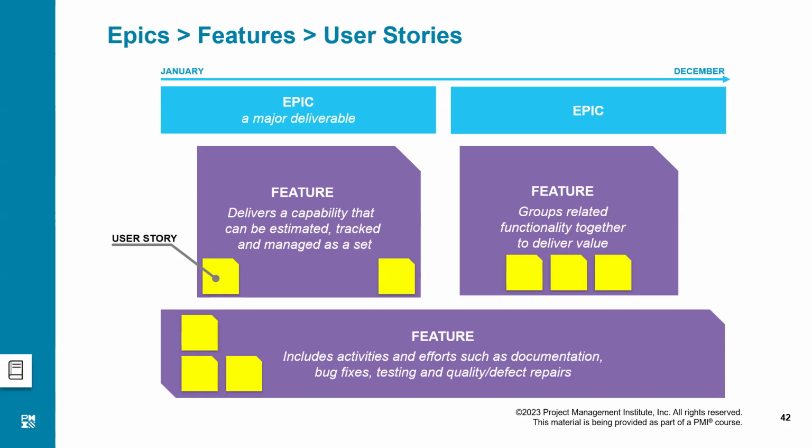Epics are big user stories. I mean, not user stories. They are the statements by the customer which are lengthy and which could be broken down into various features. Features could be broken down into user stories. So a feature may represent one user story or more than one user stories.